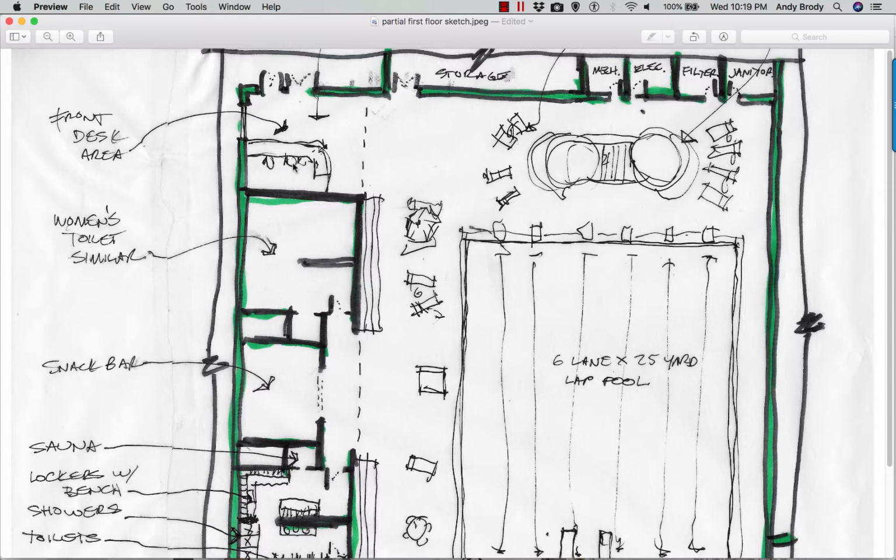That early schematic stage allows you to get a cost estimate when you are in an office, but you need to identify all the pieces, all the demolition, all the new construction, all the special construction, all the custom elements, all the things which need to be purchased.